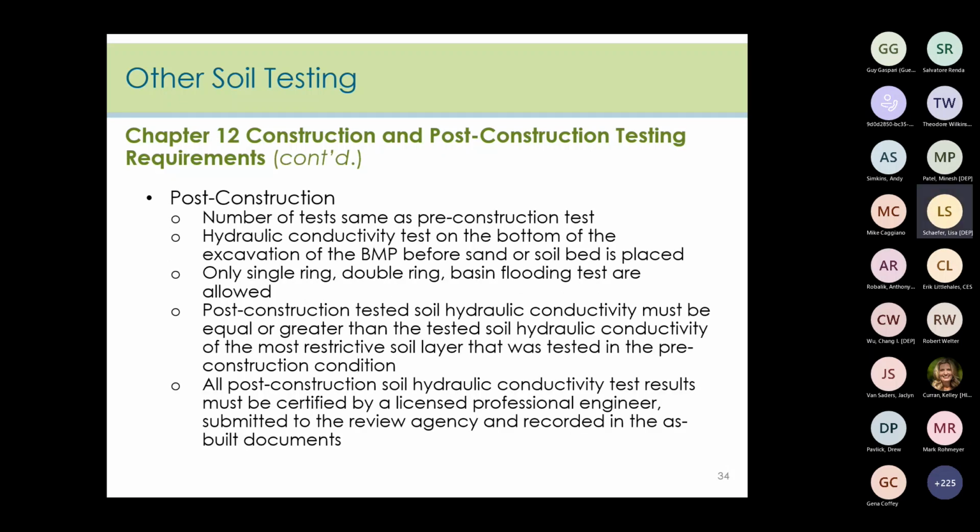Okay, post-construction soil hydraulic conductivity tests must be conducted to ensure that the installed BMP functions as designed. This is part of the design criteria in many of the subchapters of the BMP manual. Such testing must be carefully undertaken when all BMP construction that may affect soil hydraulic conductivity has been completed, and this includes the use of all construction equipment and the placement of all construction material that may affect soil hydraulic conductivity. In addition, hand tools and manual permeability test procedures must be used to avoid affecting the soil hydraulic conductivity. The required number of tests for post-construction testing are as follows.